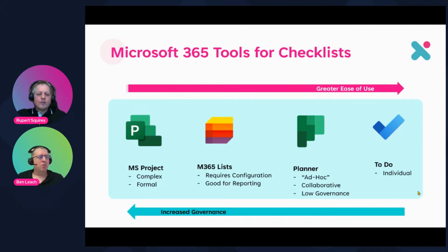We then have Planner, which is often used for this type of use case. So Planner is effectively a set of tasks for a given team. It integrates natively into Microsoft Teams, so you can spin up a team, create a planner, create a plan within that. It's very collaborative. There's not an awful lot of governance around it though. So if you need to control who can have access to what, if you need to be able to filter out so that individuals can only see their tasks, for instance, it doesn't give you that capability. And as we'll see fairly shortly, it's a bit difficult if you want to repeat it and create standardized templates, for instance.